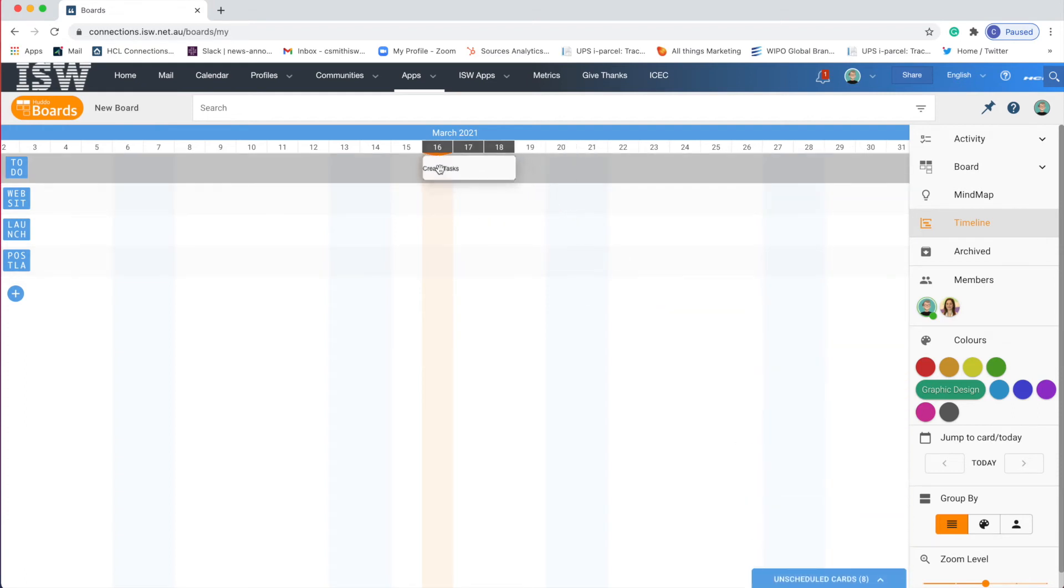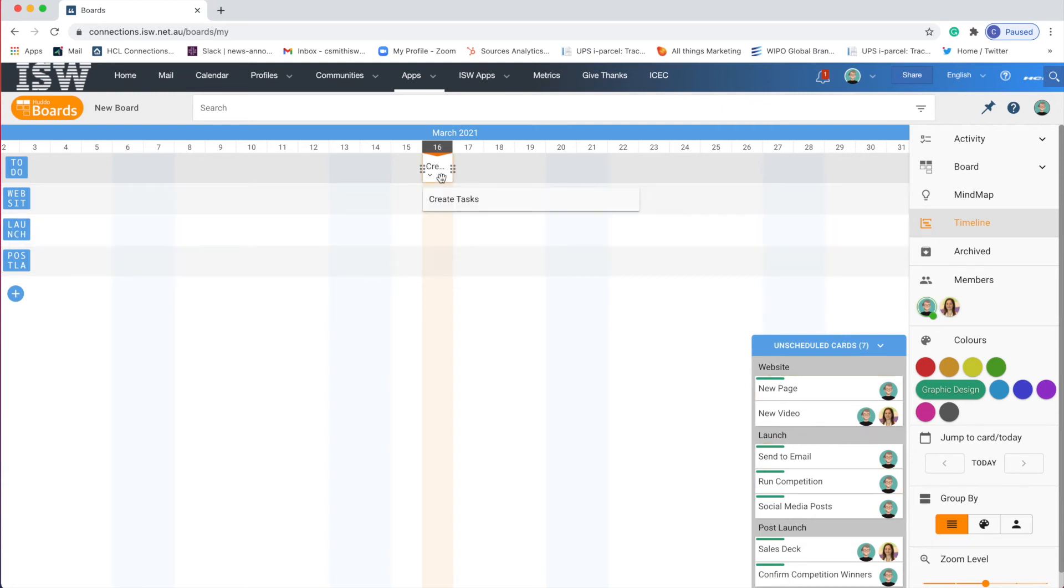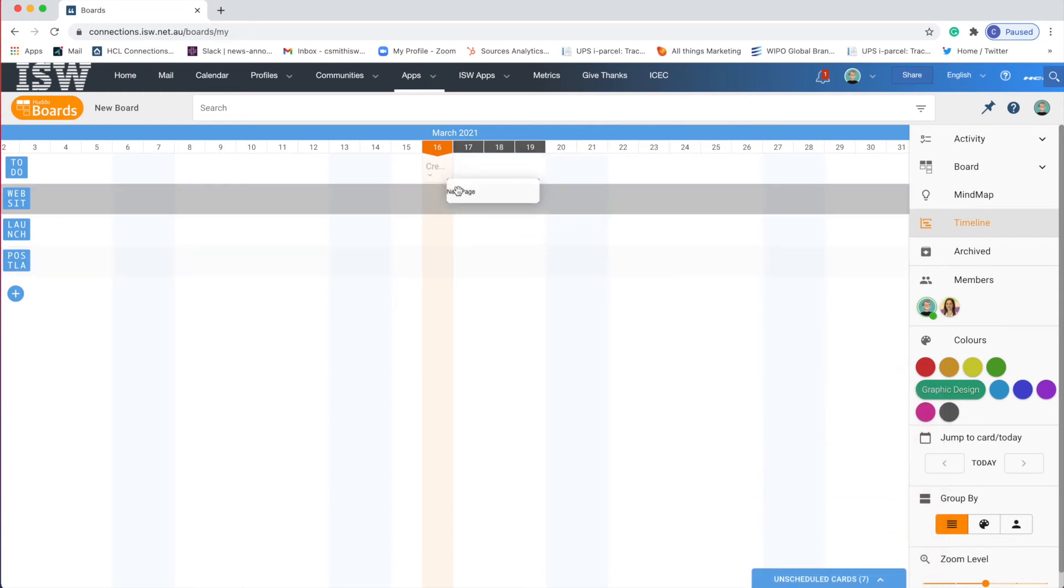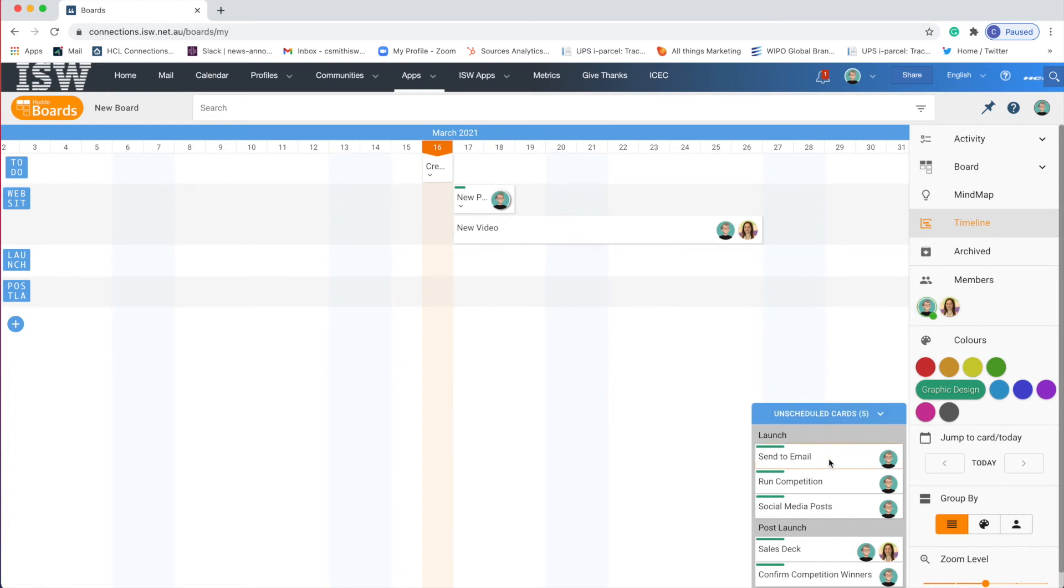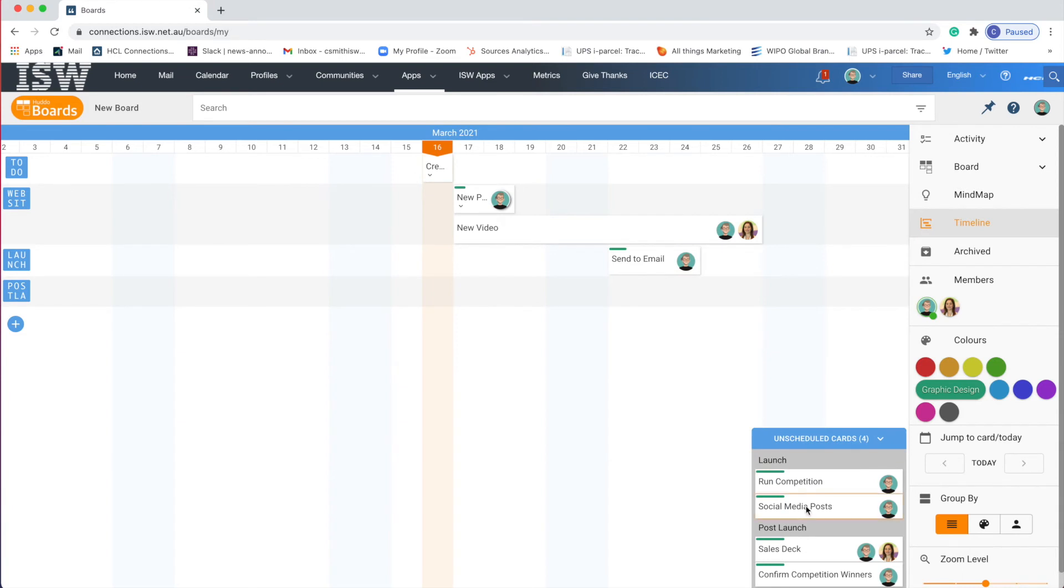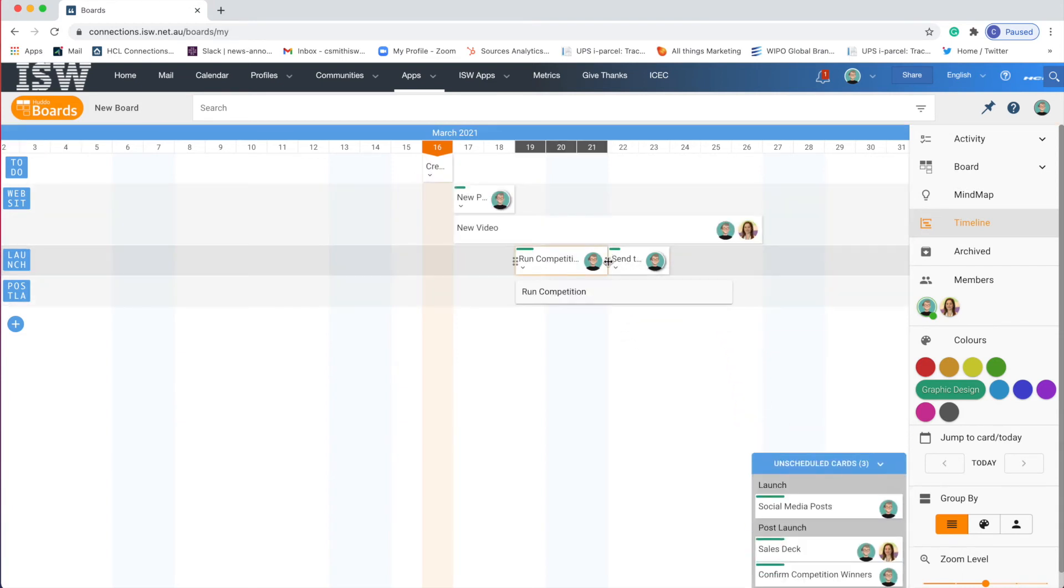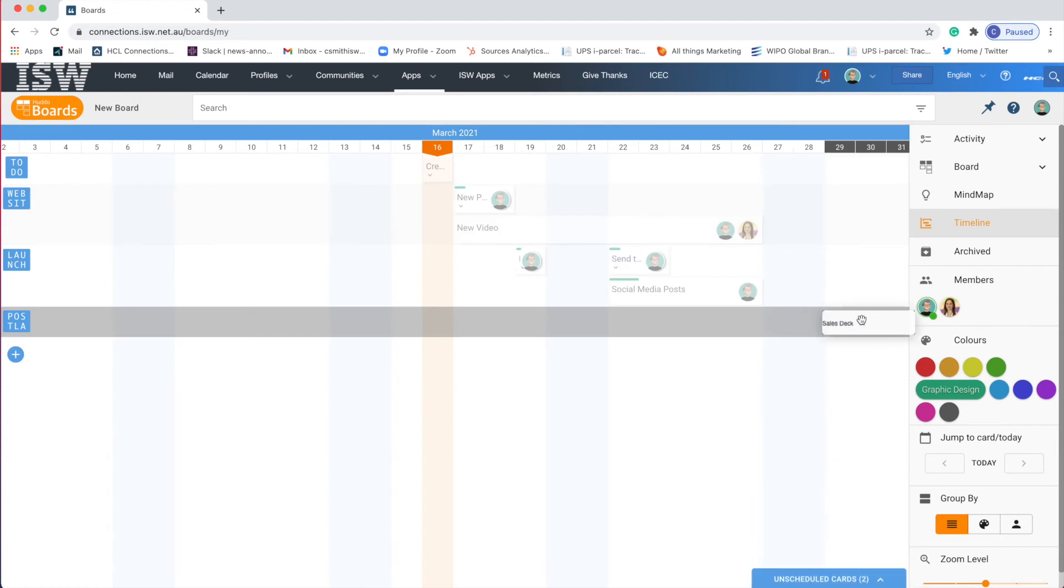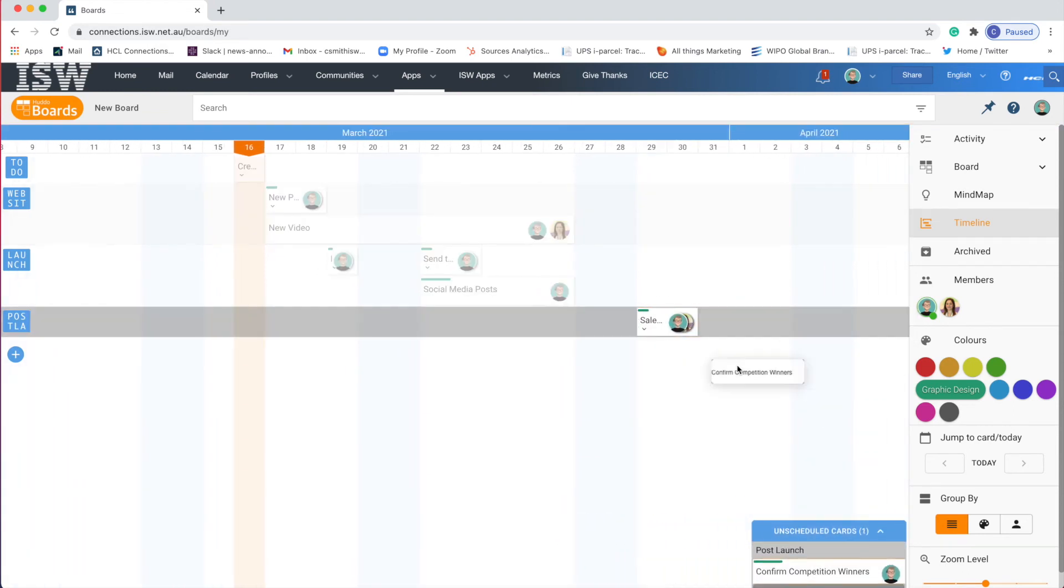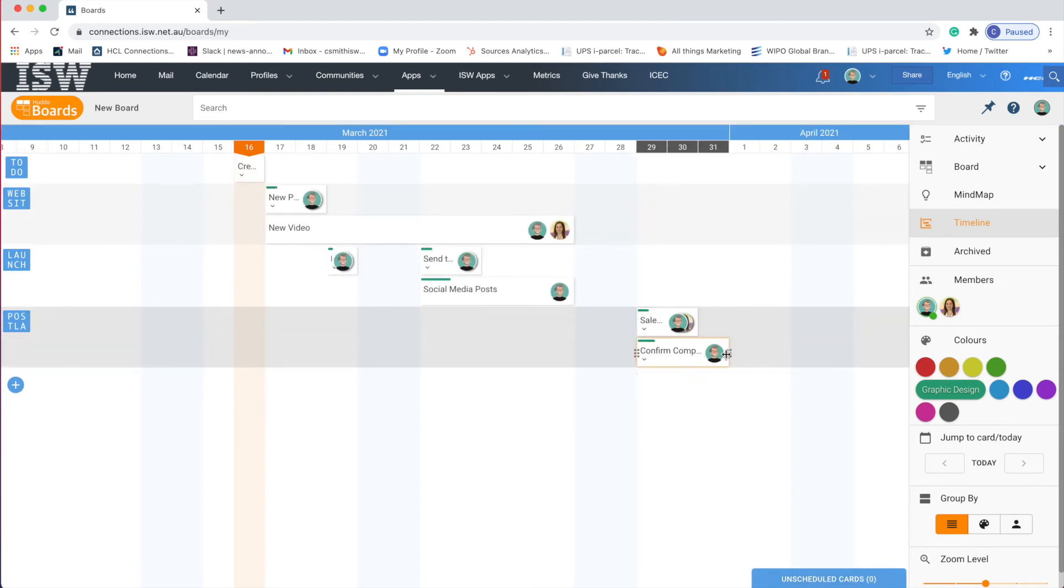If I take one of these and drag it to my board you can see that it's now added a beginning and end date and I can click and drag and extend or shorten this date. So I think creating tasks is only going to take me a day. But then I can say well I want a new page, it might take me a couple of days. New video is likely to take me longer, you know I might start the same time but it might take me almost 10 days. And then email maybe I'll start that next week. It might only take me a couple of days. Competition maybe I'll do that on Friday and just take me a day. Social media posts might take me a week. So you can see I'm spacing out my tasks when I think that I'll be able to complete them.